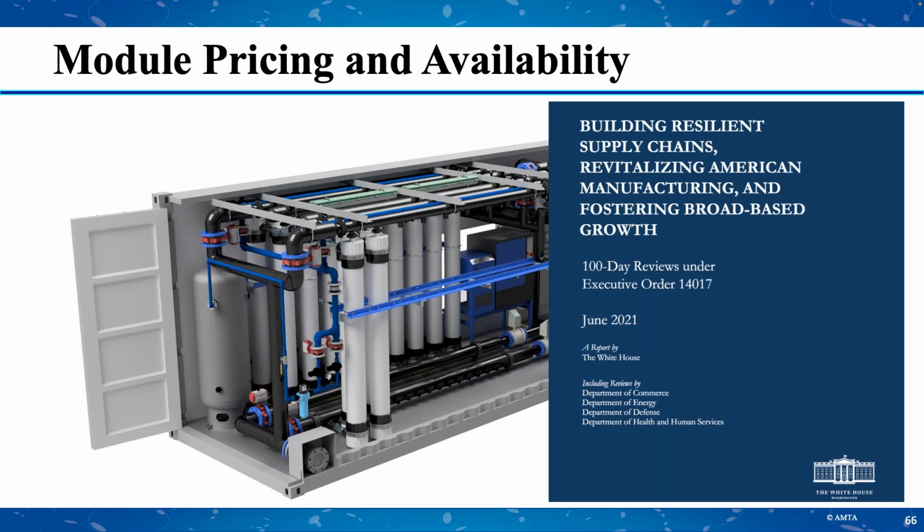We went to the membrane manufacturer that they were optimized for, and were told they were 6 months lead time. Across the US market, we were just accustomed to membranes being in stock and inventory or very quick lead times, and all of a sudden the market changed and we were looking at 6, like Ben said, maybe even 12-month lead times.